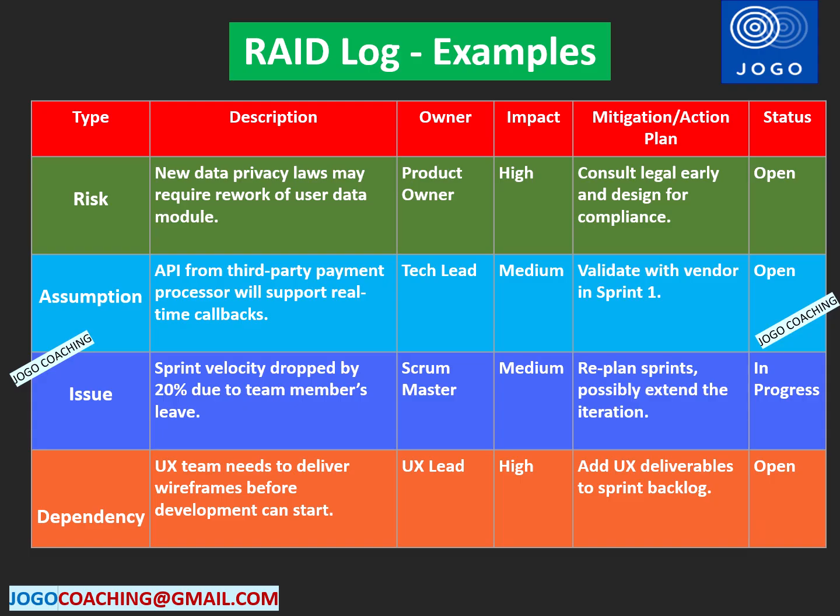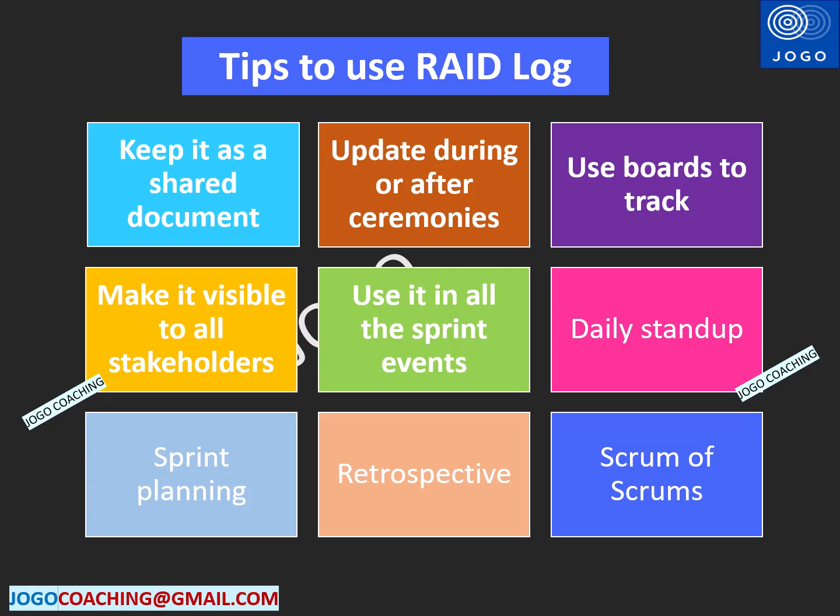Hope this is clear to you. Now we can learn a few tips about how to use the RAID log and when to use it. First, use the RAID log as a simple shared document, or in Jira or a Confluence page. The second one is to update the RAID log during key ceremonies, mainly after every daily Scrum meeting.